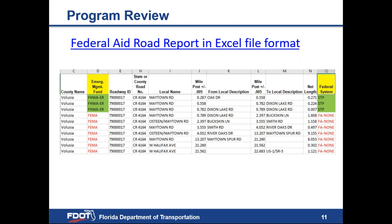As a side note, you can use this same chart when determining if a roadway is eligible for federal funding through the LAP program. If column D says FHWA ER and column Q says FTP or NHS, the roadway could be eligible for federal funding through the LAP program. There are some exceptions, such as safety projects, sidewalk projects, and trails, though those same projects would not be eligible for FHWA ER funds.